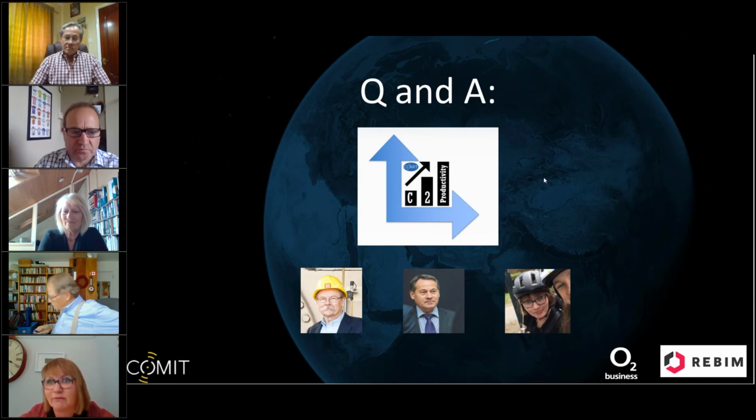It's very, very difficult, as you alluded to before, Jeff, getting information from the different utilities, even for government projects. I've just seen it take 6-8 months trying to get hold of one particular data set for a very small geographic area. It's just very costly in itself. Yeah. Over to you, Russ.